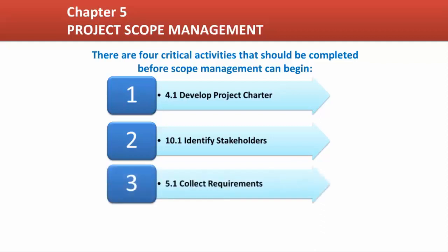3. The specific needs of the customer and stakeholders will drive the project work and thus the project scope, so before we start collecting those requirements, we need to know how we'll approach gathering, organizing, prioritizing, and managing the requirements. All this is described in the Requirements Management Plan, a subsidiary component of the Project Management Plan. The Requirements Management Plan is created in Section 5.1 Collect Requirements.